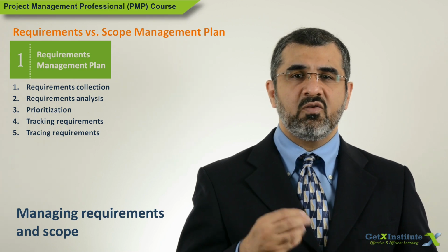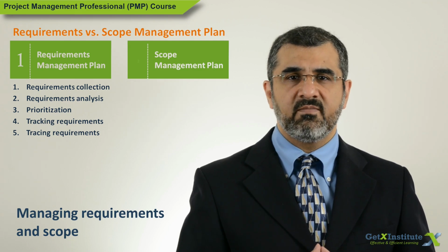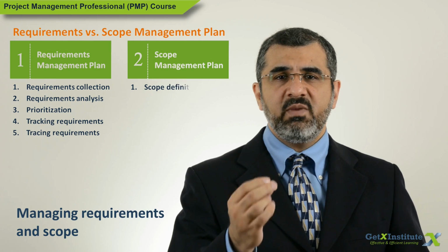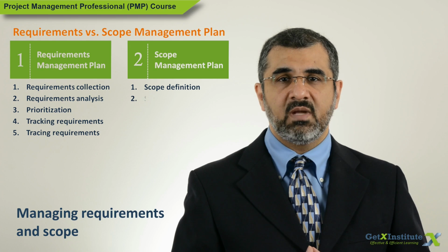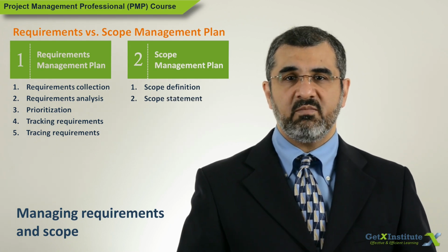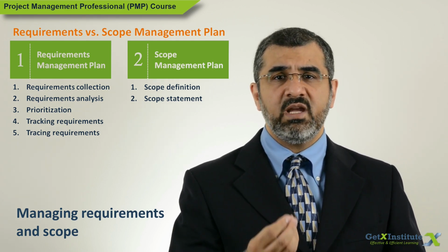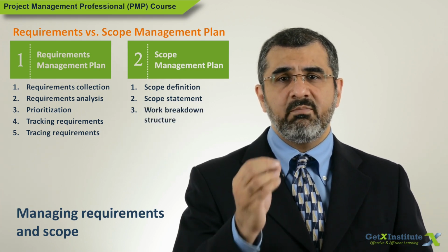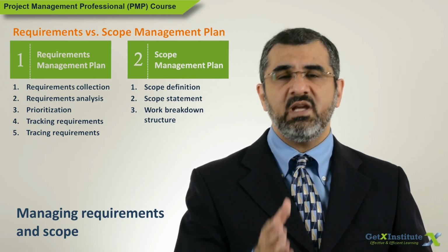Now the scope management plan will have other details. Scope definition. How the scope will be defined. Who will be involved in this? Scope statement. Who will write the scope statement? Which format? Who will approve the scope statement? Then work breakdown structure. How the WBS will be built. Is there a template to use? Who will be involved in that?